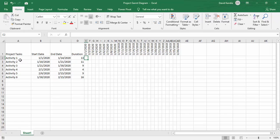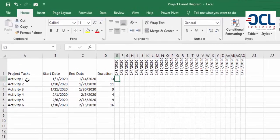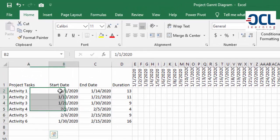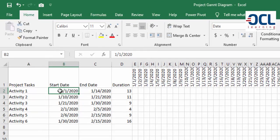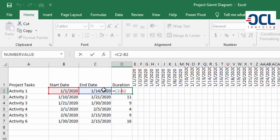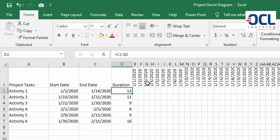You've been provided with activities on column A, the project start date on column B, end date, and the duration which is basically the difference between the end date minus the start date.